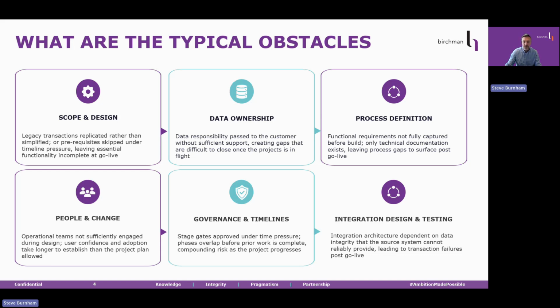The more common failure mode, though, is the moment that the development team hands data responsibility back to the customer without adequate support. And the customer accepts it because no one wants to admit that nobody fully understands the source system, and that gap is very difficult to close after go live.